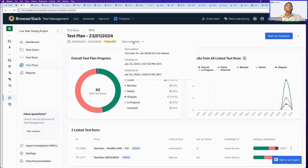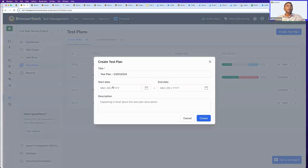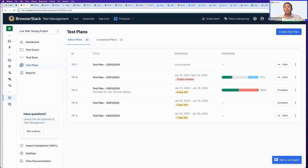I can see overall progress of testing activity for this test plan through a graph, along with when it was created and its description. Every test plan has a start date and end date so you can track whether you're on schedule. Test plans align with your upcoming releases and help ensure your teams adhere to timelines. One test plan here shows it's 13 days overdue — the completion date was January 10th and we're already on January 23rd, with only 57% progress. Another test plan is 100% complete with 8 days left, so I can mark it as completed.